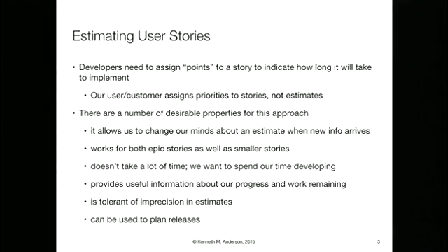By keeping them at this brief level that is supplemented by conversation, if we say the first time that we look at the card, oh yeah, I think this is a 2-day story, and then we get started on it, and I ask a few questions and suddenly reveal a whole other aspect to it that I wasn't aware of, we can be more flexible about changing that estimate. We knew that we were making the initial estimate on a small amount of information that we knew would expand as we go forward.